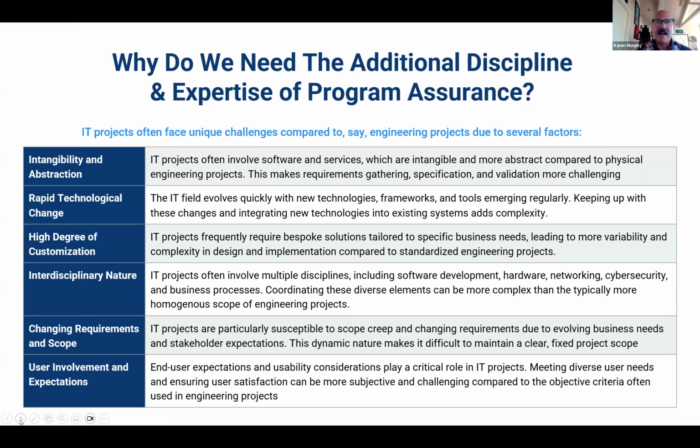So let's take the first one, abstraction. I think that was mentioned in the examples. We can take very broad goals in a lot of RFPs and projects, but we don't have the detailed specifications yet. As the program goes from broad goals to detailed specifications, there are so many potential results, which can increase effort and complexity, and it can take a project with a much more modest effort envisioned and make it a much more complex program very quickly.